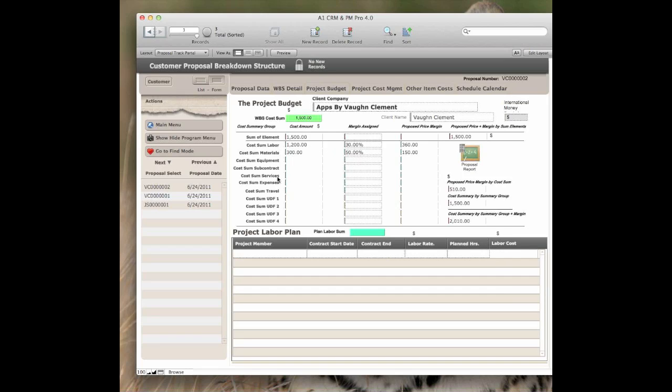If you're looking at those, doing these first as far as labor is concerned, you can see your major driver in any project is your labor. There's two parts to the actual bid rate that you're working up at the top of the screen. For example, if you're doing a sum of the elements, which is this line here where it's divided, you can take 100% as far as a markup if you wanted to, or anything below that.